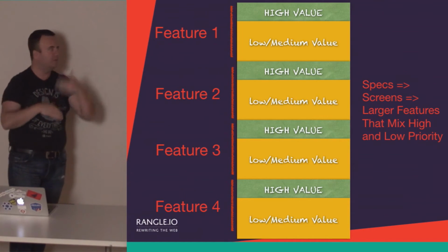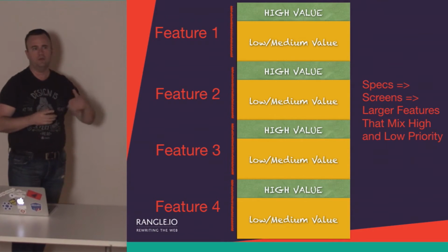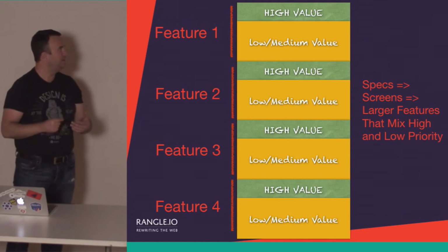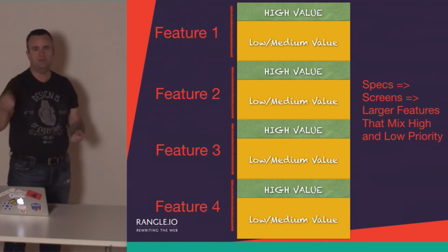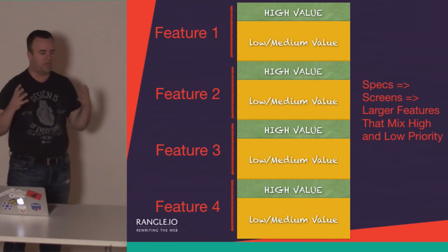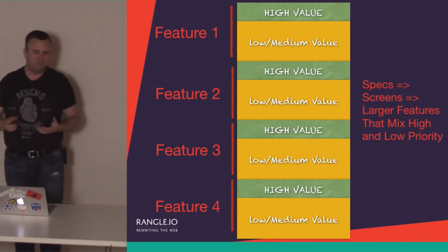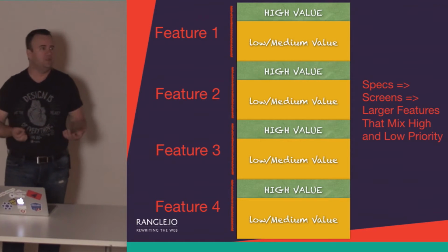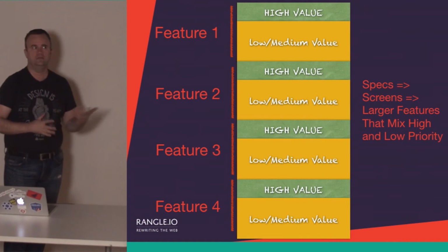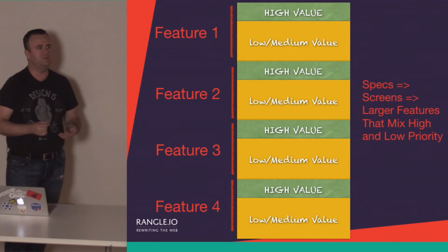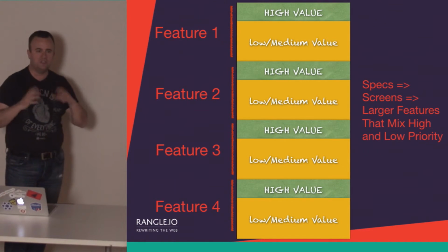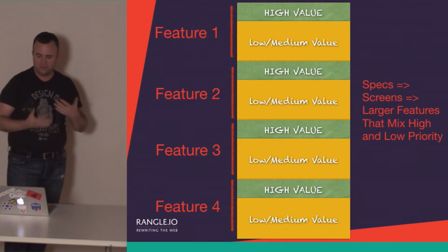Like you have a form with a whole bunch of fields. It looks simple, but then some of those fields require a lookup in another database. They require some back-end modeling in the system. And you can't really deliver those because someone's looking at the screen, they're waiting for the screen, they're QAing the screen, they're showing the screen to the stakeholder. Everything's working at this level, and now you have a story that someone said was an 8-point story, and the team thinks, well, they're supposed to be 2-point stories. So they try to break it up, they can't, and so they just change it to a 2-point story. So you have something that's 2 weeks of work, that's going to take 2 points, but that's okay, because in Scrum it's about velocity, points aren't days. It's dysfunctional. There's just not the right unit of work there, and specs drive a lot of that.